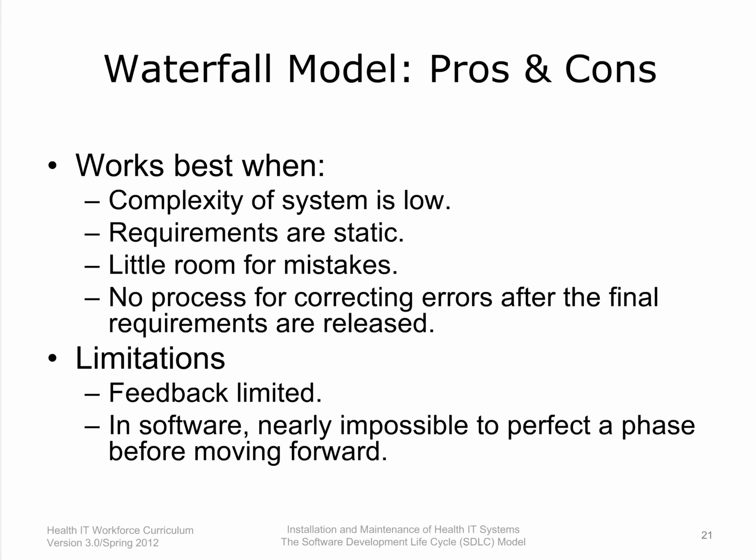Slide 21. Using a waterfall methodology is most likely to be successful when the complexity of the system is low and requirements are static, but there is little room for mistakes and no process for correcting errors after the final requirements are released. Feedback can be quite limited when using this approach, and as I mentioned previously, most believe it is nearly impossible to finish a phase of a software product's lifecycle perfectly before progressing forward to the next stage.